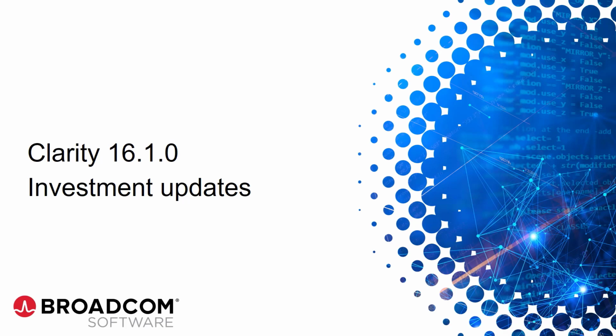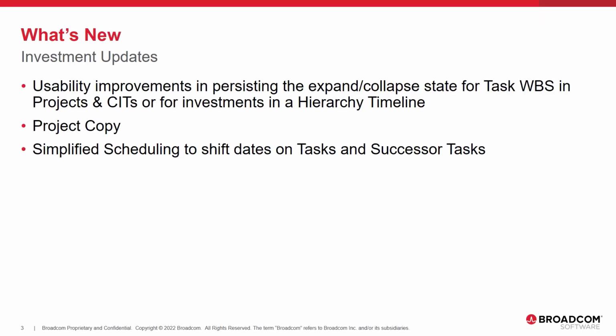Clarity 16.1 Investment Updates. This presentation will cover 3 topics. Our Portfolio and Project Manager, Dana Lewis, will enjoy improved usability within project or custom investment task timeline for persistence of the expand collapse state of the tasks within the WBS. Dana and other project managers will now have the ability to copy existing projects, and will conclude with a topic on how Dana can perform simplified scheduling to change the dates or duration of tasks and optionally have all dependent successor tasks automatically shift based on changes to the start or finish dates.